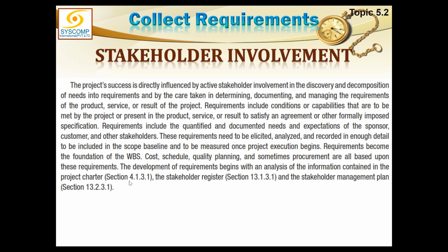If you don't accommodate all the stakeholders, you have to be very calculative. You have to be very accommodative. You must accommodate all these stakeholders, and all right requirements must be accommodated into the project scope. These requirements need to be elicited, analyzed, and recorded in enough detail to be included in the scope baseline. So when you develop the scope baseline, these requirements must be depicted there and to be measured once the project execution begins. So once the project will start executing, those scope requirements which have been included into the scope baseline will naturally be, project will be monitored according to that.